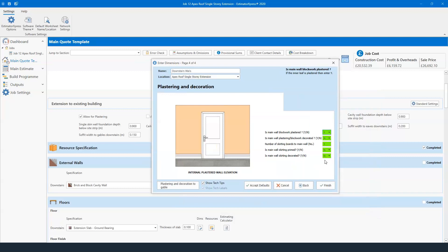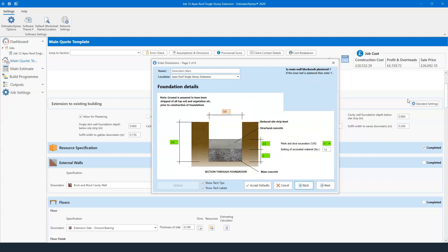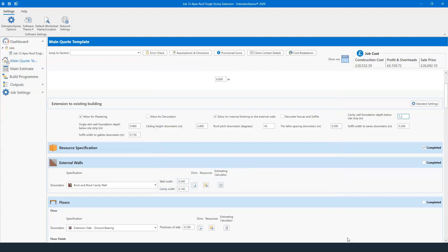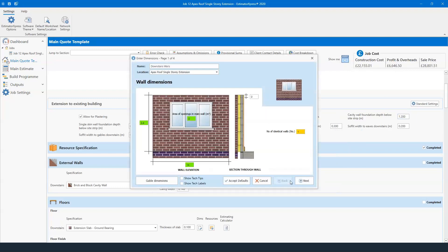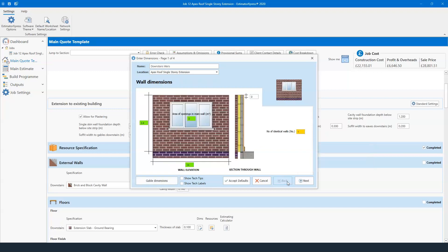Is the name all-insulated? Yes. Is there a separate DPC scene? Yes. Are we plastering and decorating? We are plastering but everything else is no because we said no to decoration — it automatically does that for us. If you change the foundation depth to, say, 1.2 meters, the price changes and going back into the dimensions page you can see the trench fill has automatically updated to 800mm. The legal obligation to support that foundation depth is now flagged in there as well.